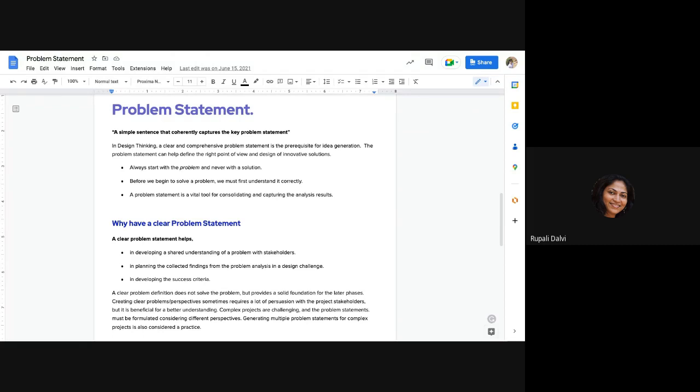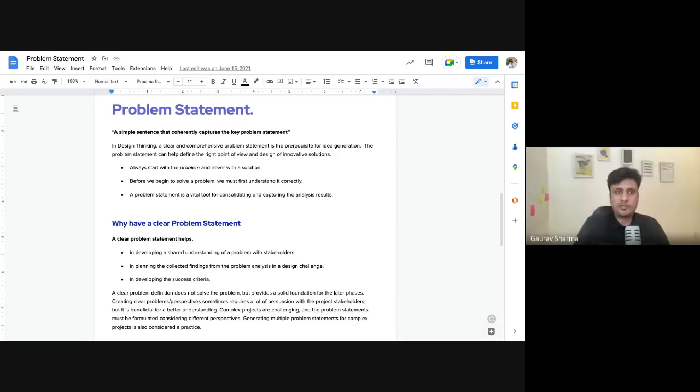What is your experience? So I think I would start with the person who's giving the problem, so that at least he and I, or she and I, understand what we're trying to solve. At times you would see that you've understood something, which is what somebody said, but please remember, what he says and what he believes are two different things. So as soon as you start showing some designs, wireframes or prototypes, you would hear things which were never considered or which were never explained, right? Which increases the time for you to design something because the scope suddenly changed.